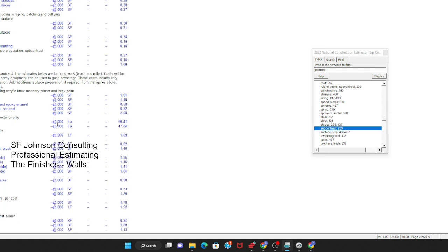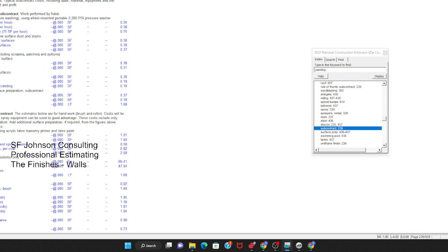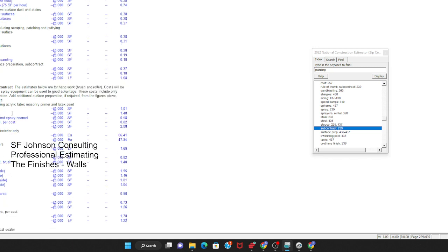Existing walls. In that demo portion, definitely could use that. Light cleaning, scraping, patching. See, and I use 25 cents per square foot. See, I cheated myself. But it's okay. Oh, wait, no, ours was gypsum. So it's somewhere between 18 and for patching. Okay, existing. That's why you get a cost book. It's a no-brainer. You ain't got to think. Okay? Just got to know how to read it.